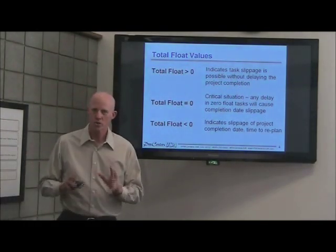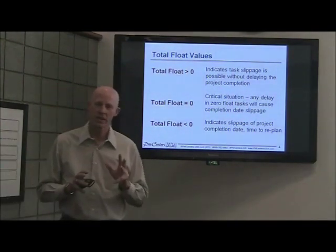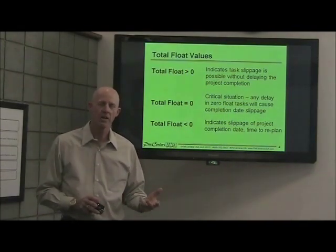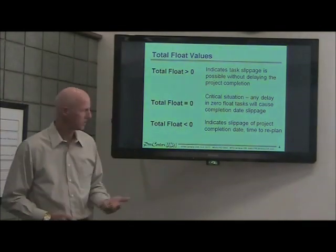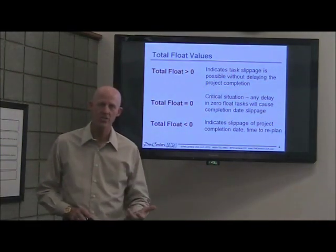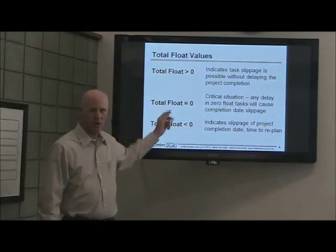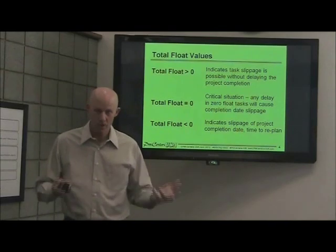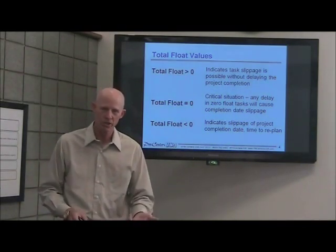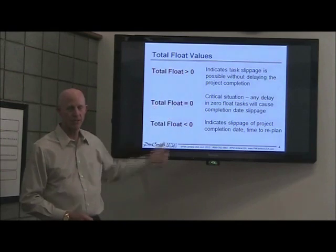When you interpret the total float, if it's greater than zero, it means you can allow that task to slip and it will not impact the completion date. If the total float is five, it means you can slip that task five days without impacting the completion date. If the float is zero, that means it's critical — you really can't allow it to slip because a day of slip will delay the completion date by a day. There's no flexibility when the float is zero.